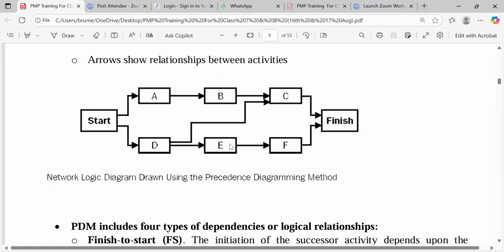Okay, if it is clear, that is why it's called the near critical part. When you are dealing with the critical part, protecting the critical part, don't make a decision that will affect the near critical part, because that near critical part cannot be longer. Because if D eats up 4 days, E is already affected, F is already affected. That part is already affected. D, that is a member, alone went to eat up 4 days, whereas in their union, they have only 3 days to play with. It will even affect the whole non-critical.